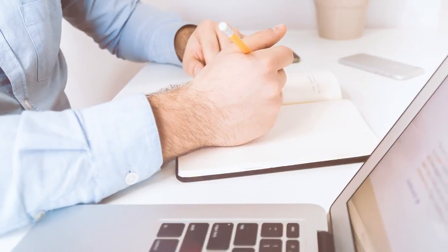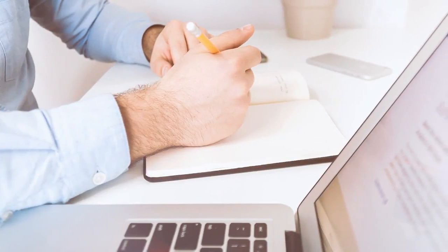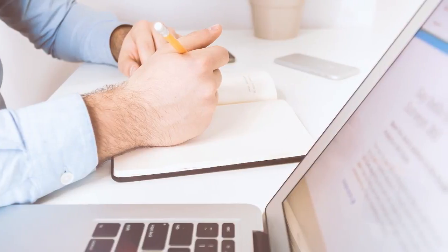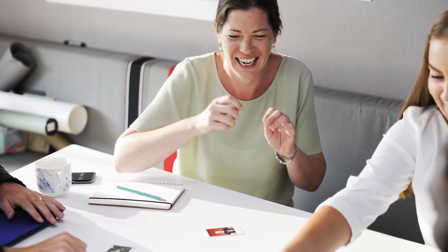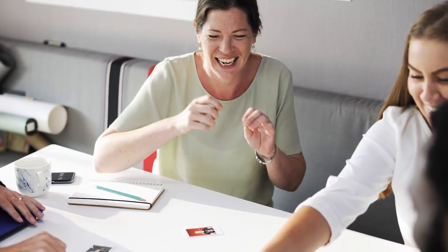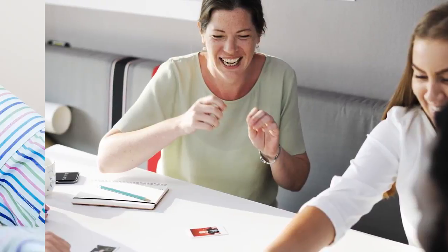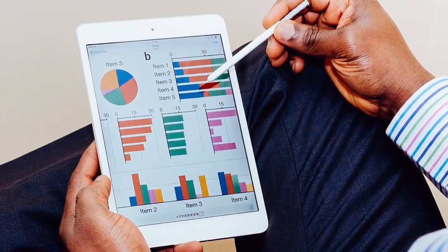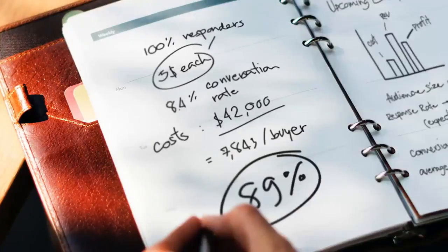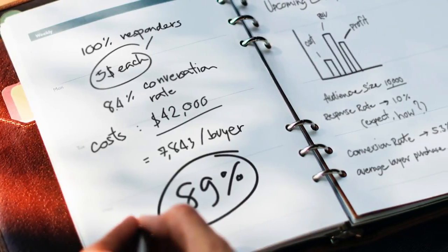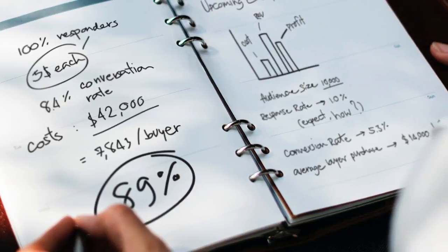Review the current operations. Based on how things currently are, what might you have to change in order to accommodate the project? Duty hours, unit policies. Conduct stakeholder analysis. Talk to those individuals that will be impacted by the changes the project will bring. Are their needs being taken into consideration? Do they have concerns you haven't considered but should? Conduct a financial analysis. How much will it cost to complete the project? Are the funds readily available? Create a budget. Based on the amount of funds made available, what do you need to allot money for?